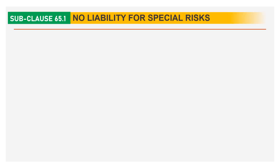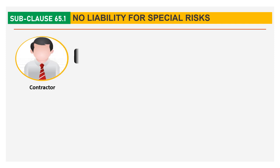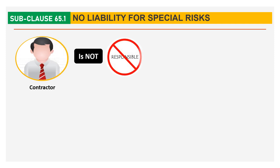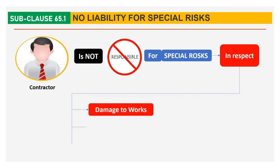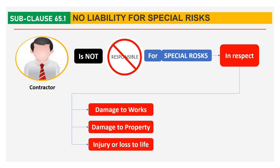Now we will discuss sub-clause 65.1, No Liability for Special Risk. The contractor is not responsible for Special Risks in respect of damage to works, damage to property, and injury or loss of life.